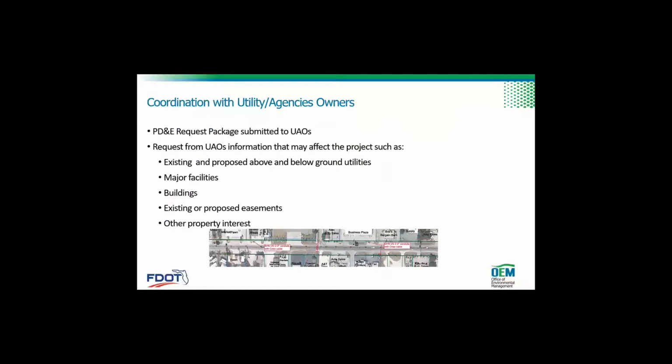Okay. So coordination with utility agency owners. Like I said, that's done through the PD&E request package. So the requested information may affect the projects such as existing and proposed above and below ground utilities, major facilities, buildings, existing or proposed easements, and other property interests.